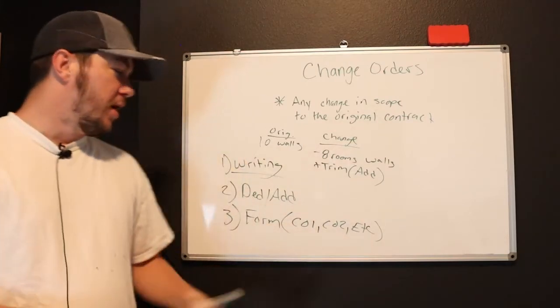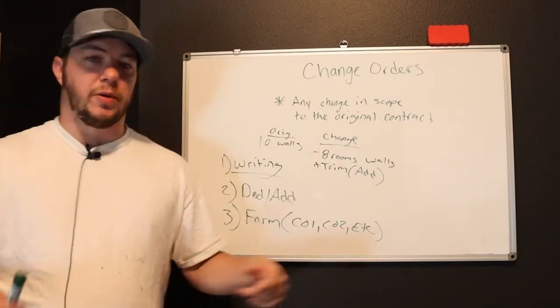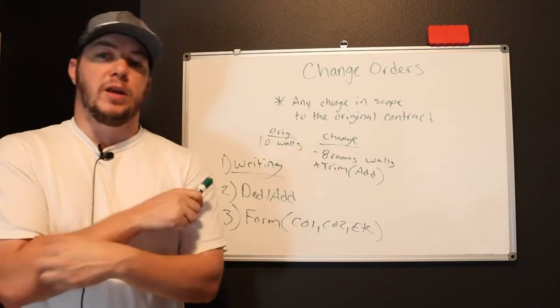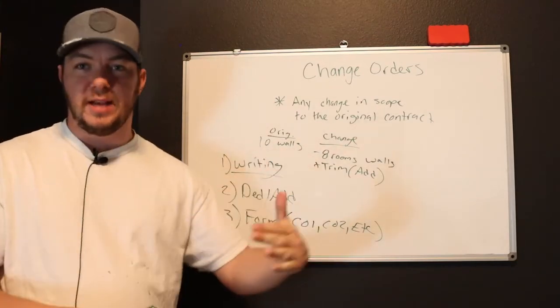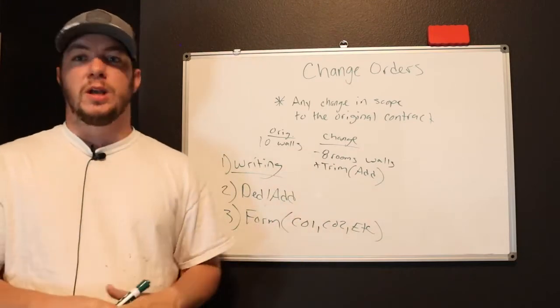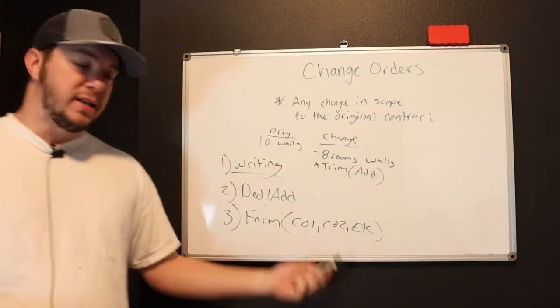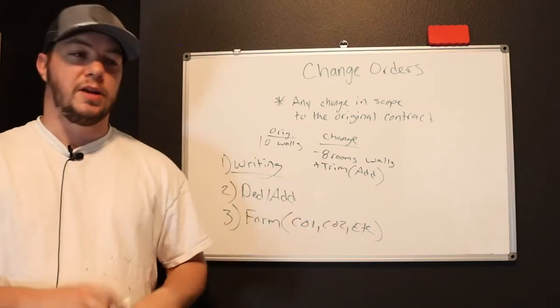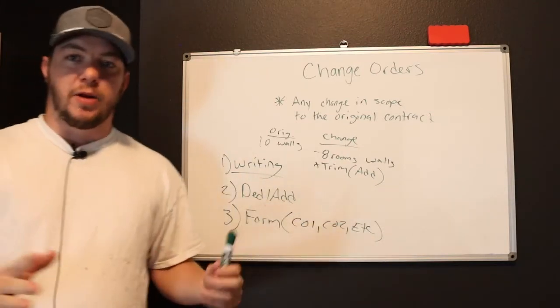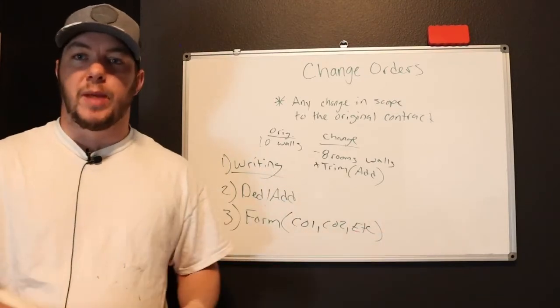You always want to save a copy, email a copy over to them. You want to download the email where you sent it or where they received it. Keep that in your files. And then a lot of times they'll either accept it immediately. They'll say, this is accepted, please move forward to work. And you'll need a copy of that as well, just for your record, in case there's ever an issue later down the road with payment.